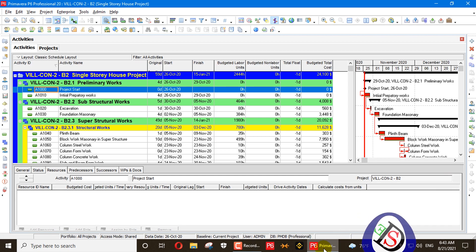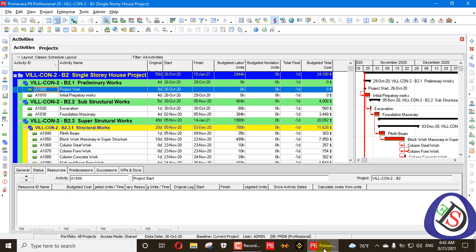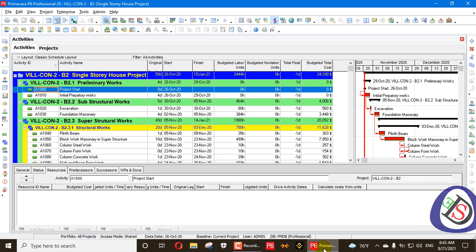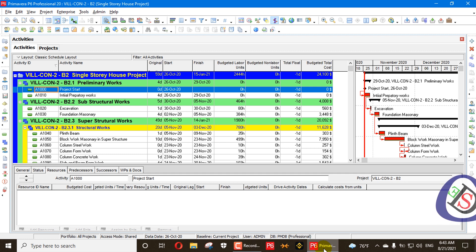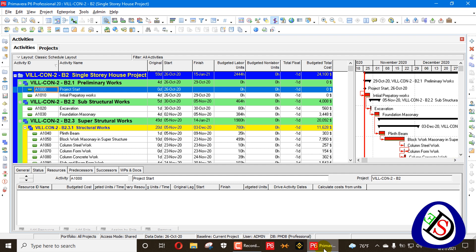So why do we calculate estimated weightages? Every activity has a weightage in its content and in a project, and that activity weight will remain the same throughout the project. Weightages are dependent on cost — for example, an activity taking more cost has more weightages, meaning it may have more labor units or more labor cost.